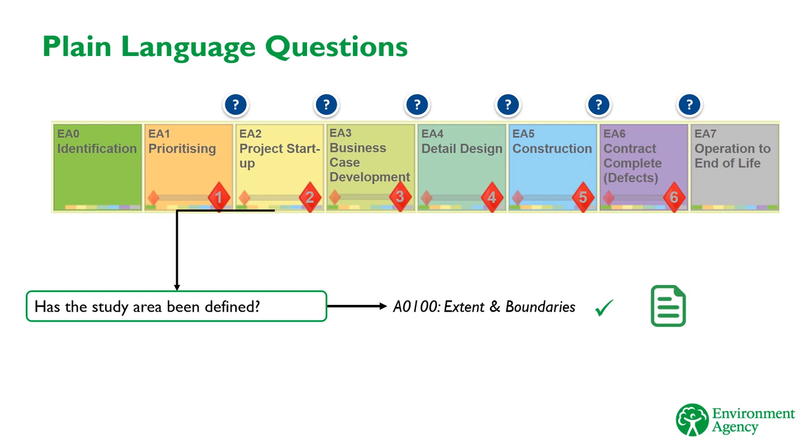This has 2 advantages. Firstly, if all projects answer the same questions, then we can assure that all projects will deliver the information we need. Secondly, this can really aid gateway reviews by highlighting when all information has been collected, and conversely by flagging what information is missing. This will help project boards to make an informed decision on whether the gateway has been passed.